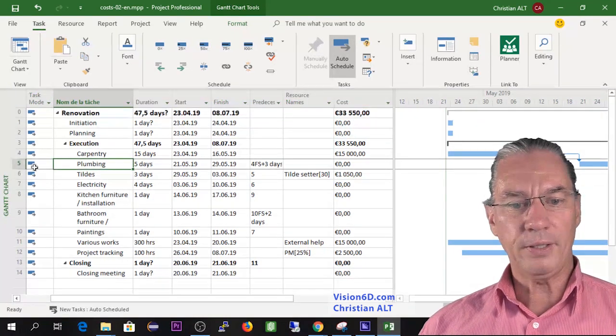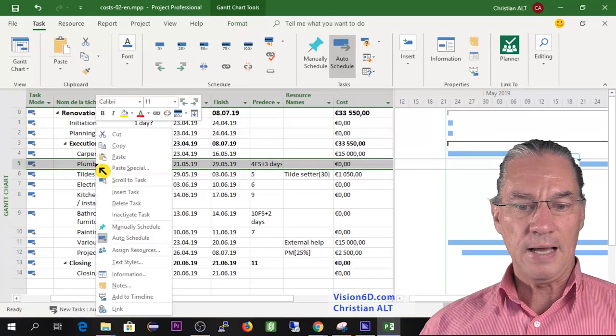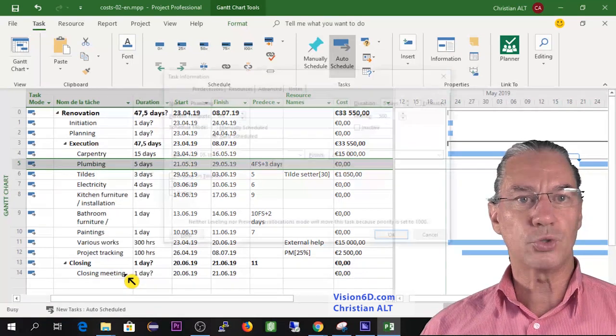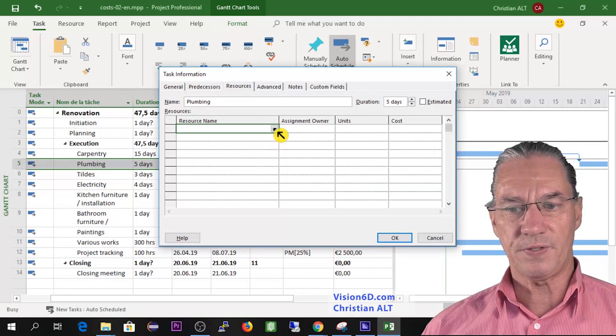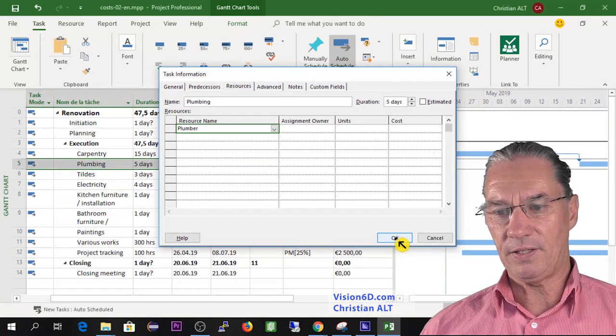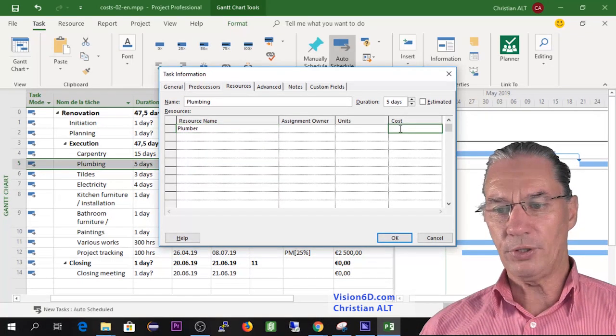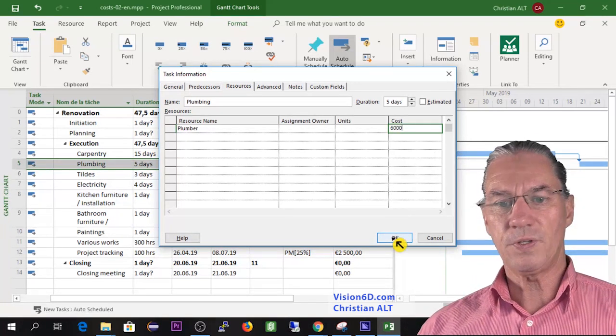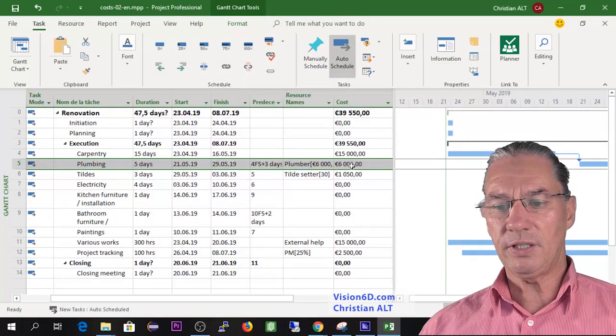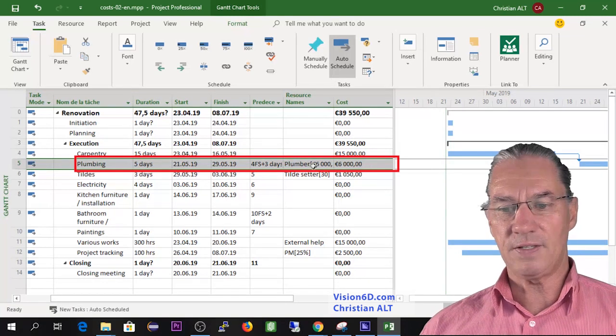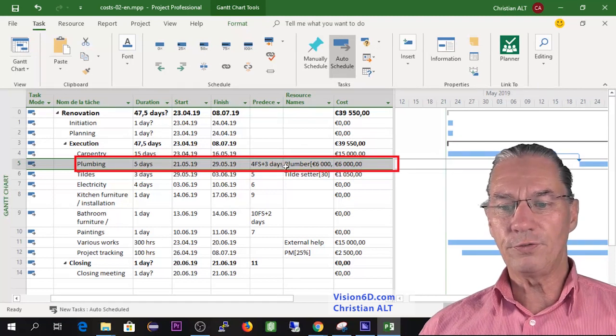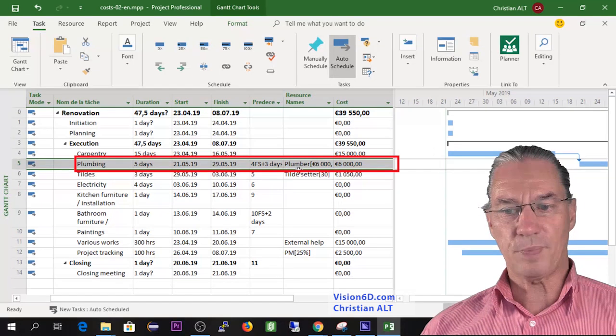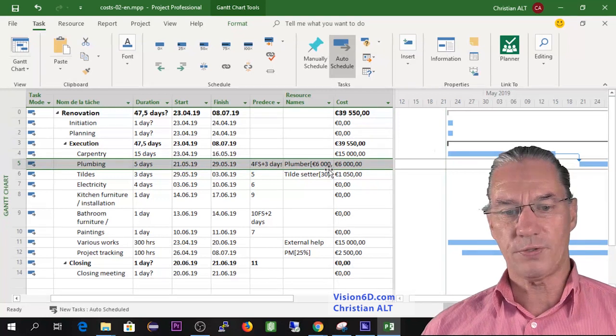Now for the plumbing, which is task number five here, I'm going to do it in a different way. I'm doing a right-click and going down to information about the task and I go into resources and here I'm going to assign to this task the plumber and I say that the plumber will cost 6,000 euros. Immediately you see I have the 6,000 euros that come. Since it is a resource of type cost, you find the name of the resource, which is plumber, and in square brackets you find the cost.